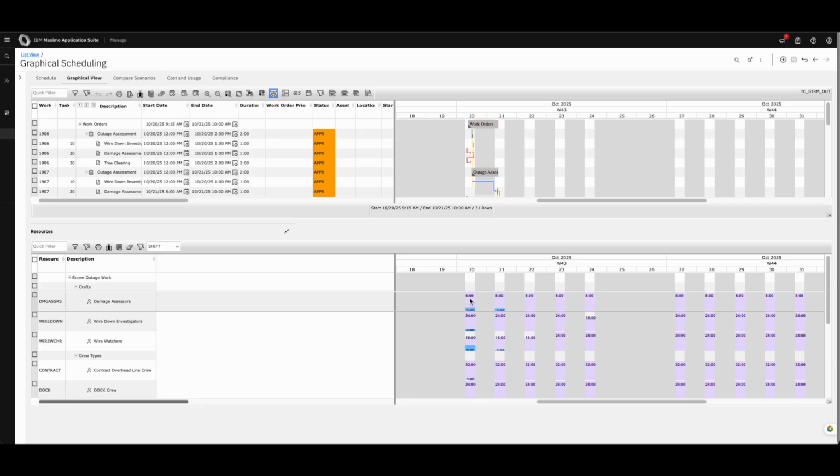Now, if we were to overplan for resources, it doesn't look like we have that now. What we would typically see is on our resource leveling, this would turn red if the blue, which is the work that's been allocated, oversees the availability, and looks like we got around 8 hours of availability across these days for this week. We can then modify the schedule to appropriately align this project to this resource leveling that we have here. And so it's a very similar view to what we saw before, but we can plan out work for way into the future, much farther than what we're seeing here, and being able to quickly allocate work to resources based